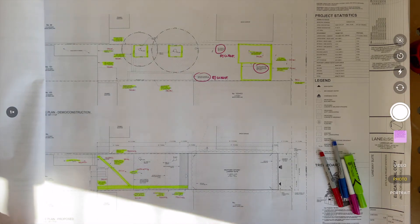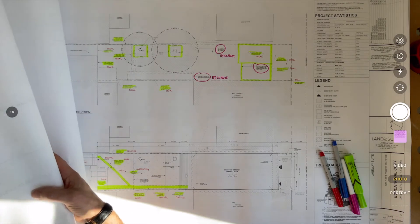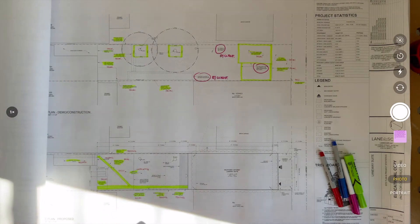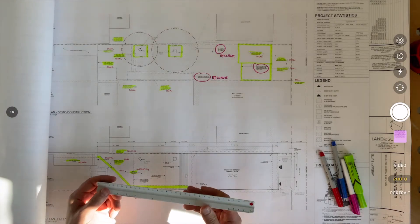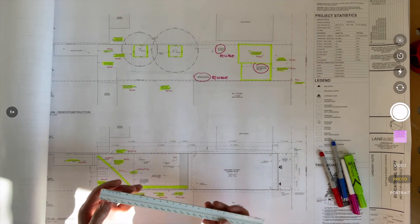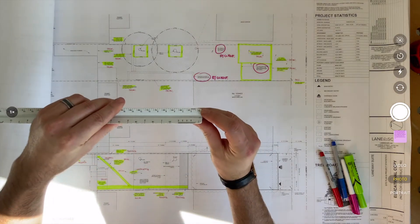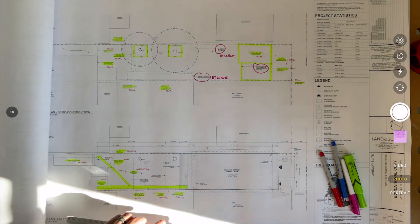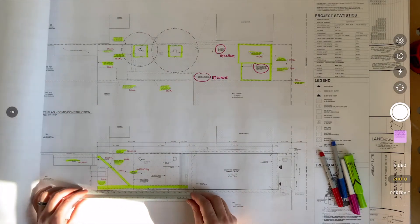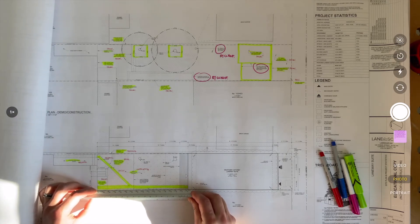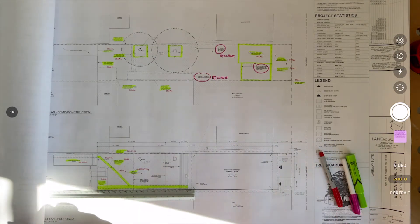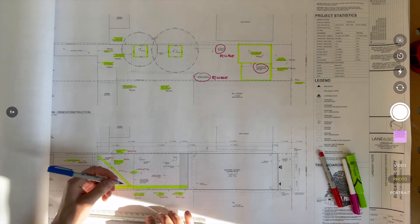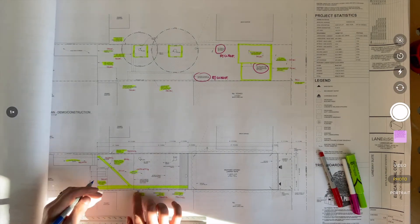So what I want to do is grab a scale. In this case it's my imperial scale. I look at my scale – one quarter inch equals one foot. I can grab my scale, flip to one quarter equals one foot, and then I can put this down on the beginning of the new fencing. So on zero, I measure across and I get 33 feet. Anytime I record information like a measurement, I don't want to do it twice. So I grab my pen – it's 33 feet.